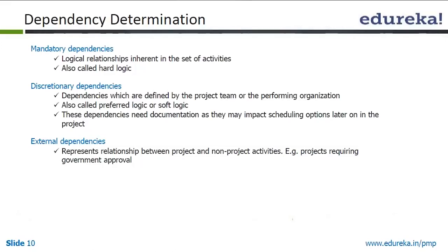We said mandatory dependencies are the ones which are mandatory, a logical relationship inherent in the set of activities, also called hard logic. That means the dependency is that some activity has to be complete before the next one can start. We have to complete the curing of the plaster before we can start on the painting of the walls.